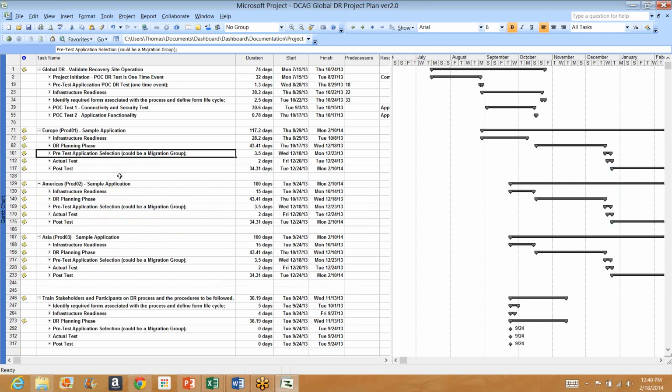Those could be comments that would make an improvement, comments that recognize the problem we overlooked, and so forth. All of that would then be brought into a report and a presentation that will be delivered at a post-mortem meeting to executive management, and those people would make recommendations for improvement. Those recommendations that are selected will be added to the recovery process, hopefully making the recovery process better. And by following this test, analyze, recover, you will then be able to build a better recovery process each time around, eventually achieving the best recovery process you can for your company.